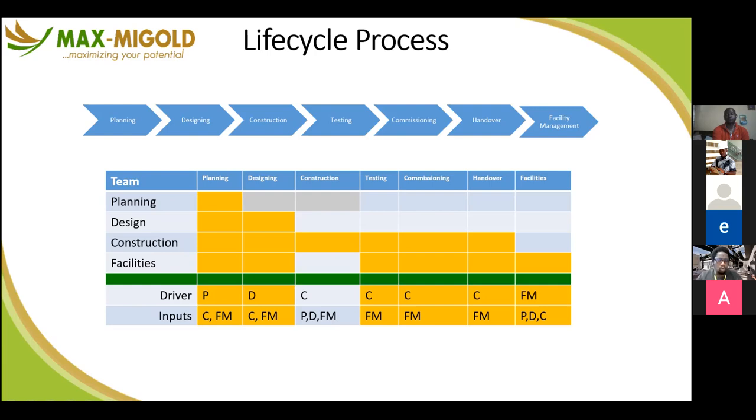So it's possible to test your generator, power the building, and plug one laptop in and say, the generator is working, there's light in the building. But the generator is rated for 700 kilowatts, isn't it? Load 650 kilowatts and let me hear what the gen is going to say or do. Aha! Because that gen needs to be able to meet the capacity for which that building was designed. Not that it works. That's commissioning.